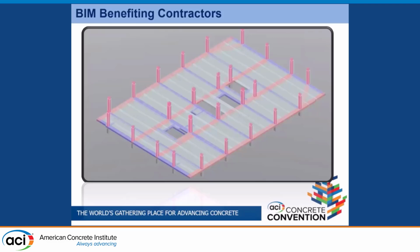But what this does is gives us the ability, if we have a structure and there's a sequence of how the rebar really needs to be placed and what direction it has to be placed, so that the congestion and also stacking them up doesn't burn the concrete. This definitely helps the placers in the field to have some sort of video of an area of a project showing how to place the rebar properly, in the right direction, what direction is laid over the other direction, right? So you wanted all your north-south bars to be placed first, you put in your sequence, and show them place the next one. If they don't know that, it could be placed wrong, and engineers' design intent may be off. You may have a failure.